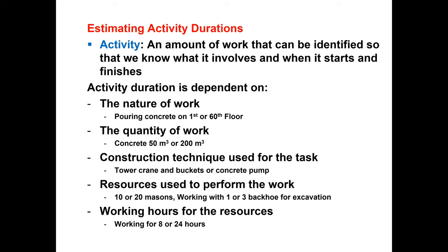Then quantity of work. Duration is also dependent on the quantity of work. For example, are we going to cast 50 cubic meters of concrete, or do we have a quantity of 200 cubic meters? If we use the same resources, then we need more time to finish casting 200 cubic meters. Again, there is the construction technique used for the task.